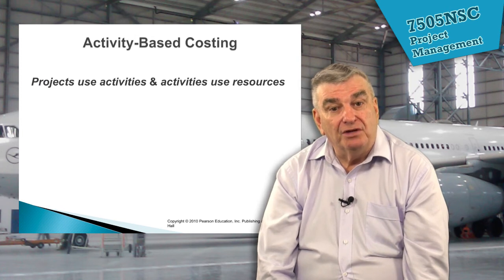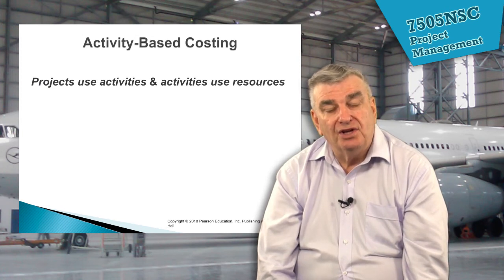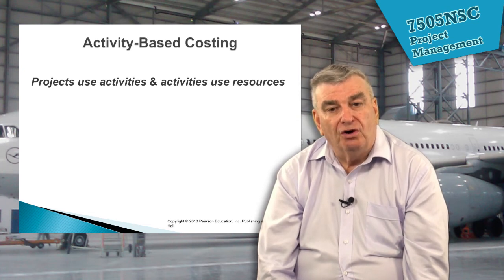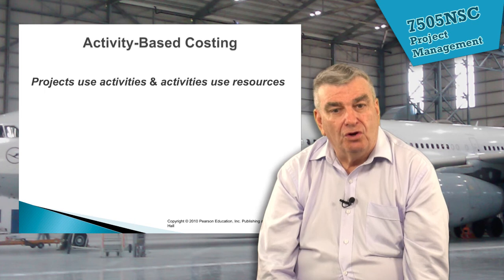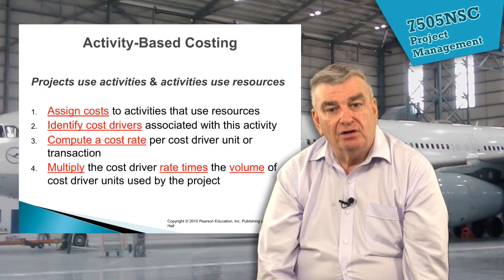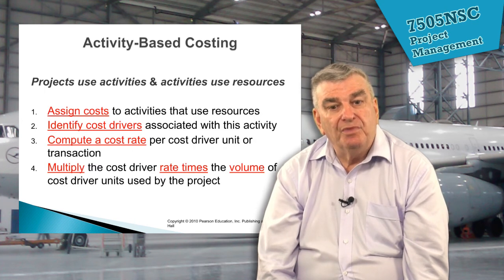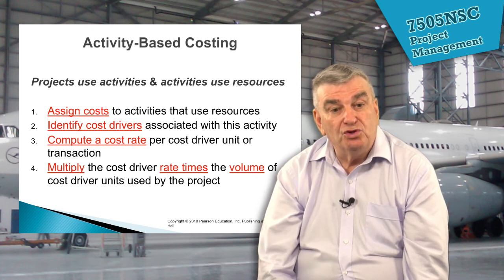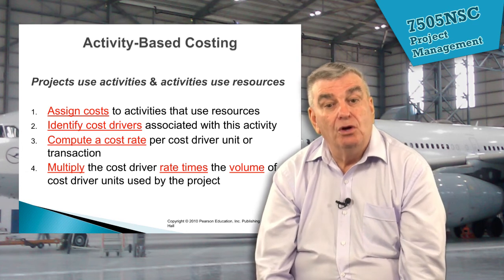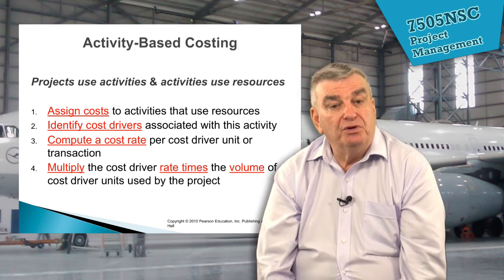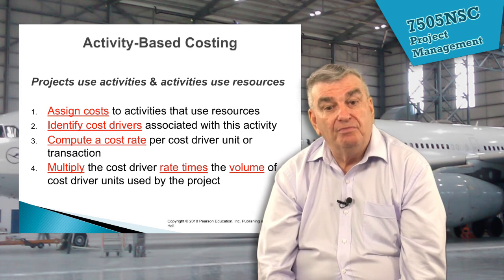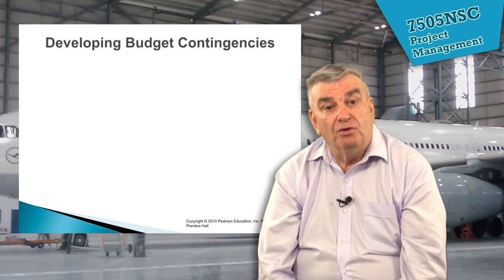Activity-based costing is where we sit down and say: if we know what the cost drivers are and what those cost drivers cost, and we've got a good idea of the time, we can get a much more accurate figure by asking: what are the resources, what do they cost, what are the cost drivers? It could be the cost per hour or the hiring cost per day of a particular piece of equipment. We can then use a multiplication factor to find out what that cost is.